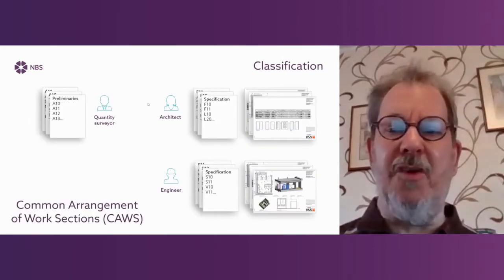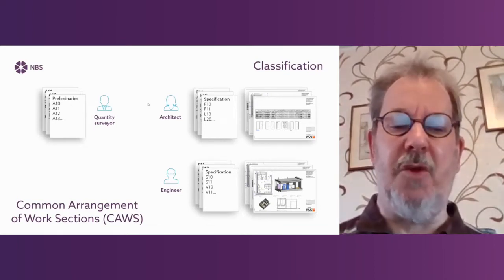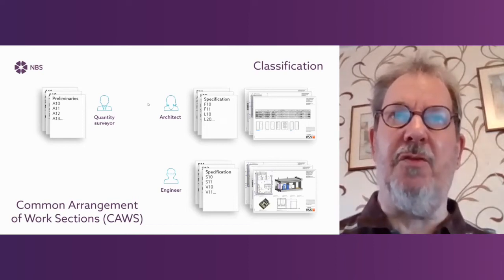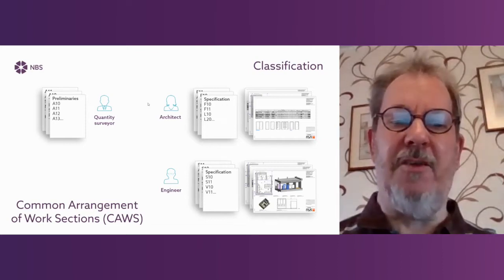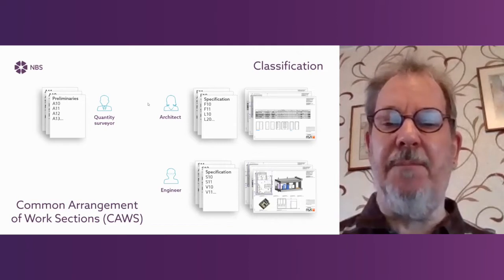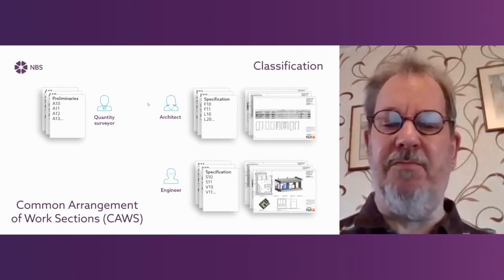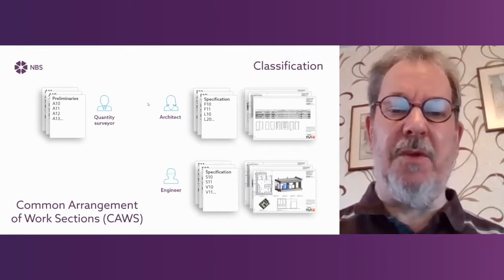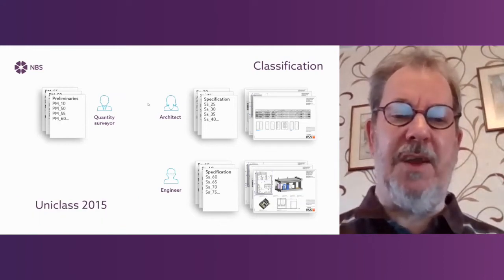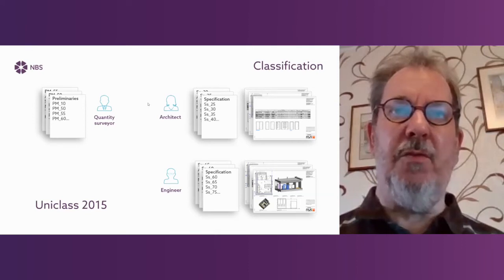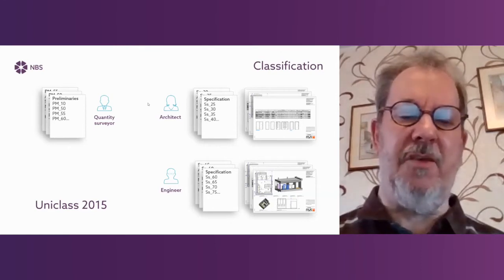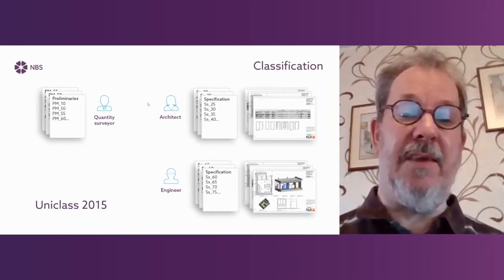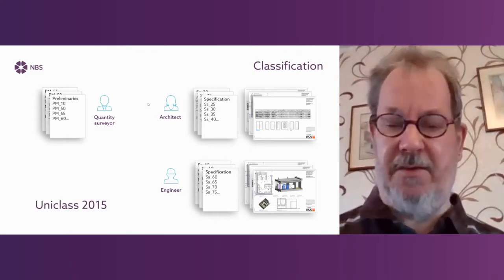If we look at it in terms of classification, NBS content is arranged in two classifications. The first one is common arrangement of work sections, and the second one is UniClass 2015. In common arrangement, preliminaries are A sections and they may be done by the quantity surveyor. The specification parts - some may be done by an architect and some, for example services, by an engineer. In UniClass 2015, there isn't an enormous amount of change in the way that things are done. The way that the change manifests itself is in terms of the classification. Preliminaries in UniClass 2015 are called PM as opposed to A sections in common arrangement. And the specification is divided up into systems and products rather than work sections.